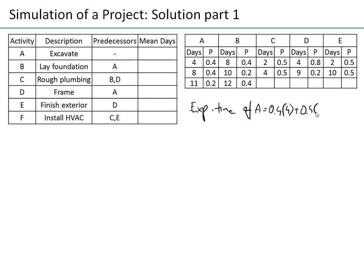The expected time of A equals 0.4 × 4 days plus 0.4 × 8 days plus 0.2 × 11 days, which gives exactly seven days. So we write here: the expected time for activity A is seven days.